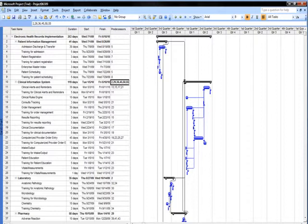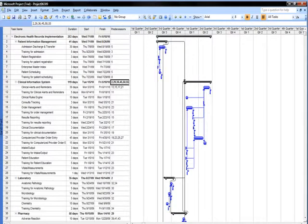In this image, the sub-tasks of the patient information management, clinical information system, and laboratory are shown. Patient information management has a duration of 41 days, clinical information system has a duration of 119 days, and the laboratory project duration is calculated to be 35 days.